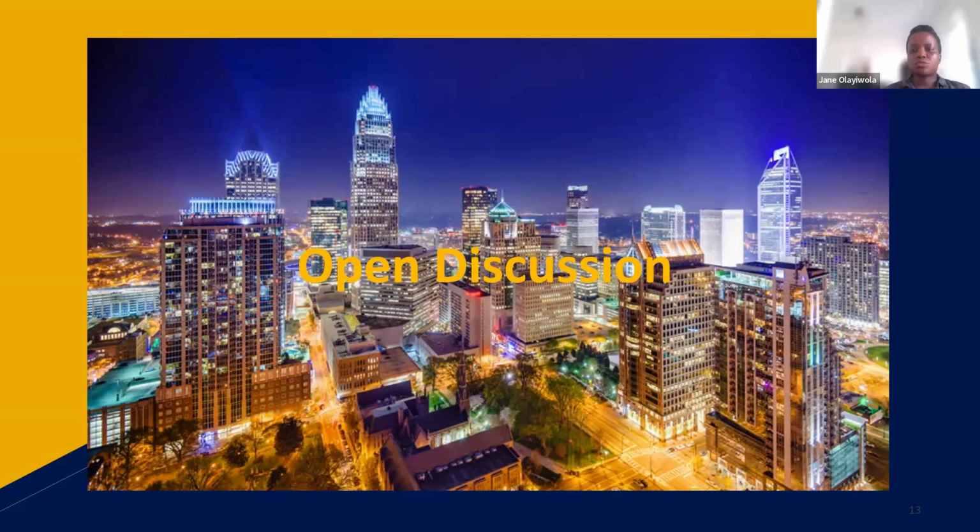So if there's a particular section of it that's really ambiguous, say, we would really love to get in really early, maybe in between the bidding process. As early as possible, if they'll let you in, maybe they can allow you to open up a portion of the wall, if the owner already owns the property. But this sounds like a renovation. So if you can do an exploratory survey in some areas to see what the conditions are, that might help you estimate a little bit better.